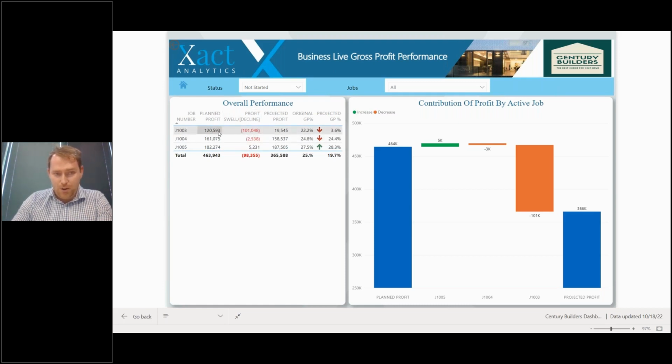So whether you're spending under or over, this isn't what you spent. This is where your profit's eating away, and it's eroding this. Because if, again, the retaining walls come in at 10, and you quoted 10, that won't move. But if it's coming at 12, you've lost 2K of that profit, and that's the really, really important piece.